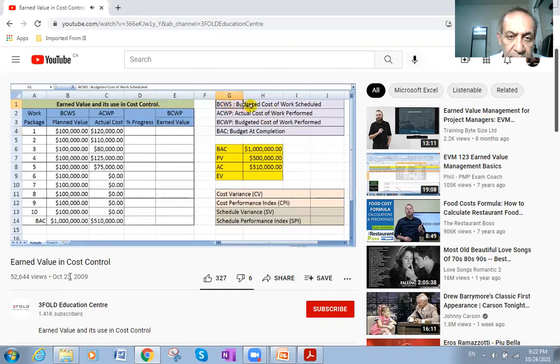PV means the budgeted cost of work scheduled. I have scheduled the first 5 months, 5 work packages, and I budgeted 500,000, which is my planned value. The next one is actual cost of work performed. It's my actual cost: how much money I spent for the work I performed.